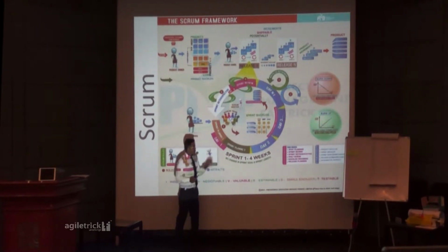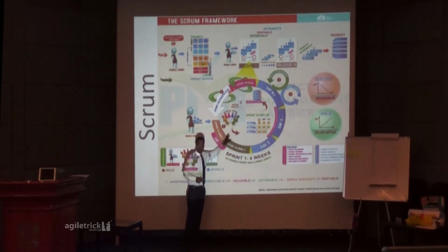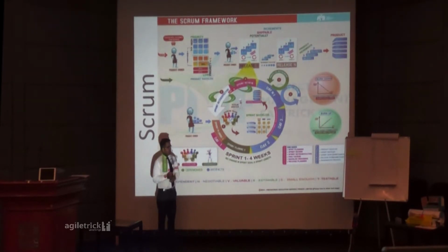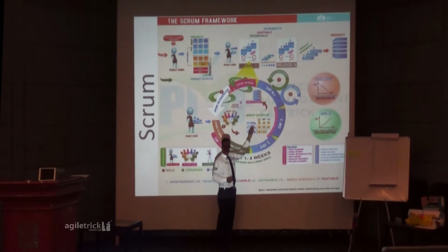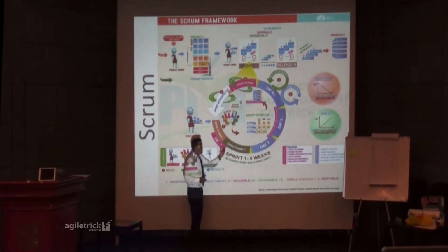The team needs to understand the business logic, user stories and acceptance criteria in sprint planning meeting 1. Any queries or questions they need to clarify there. Once clarified, they identify the top 5, 7, 10 or 15 user stories, and then they go to sprint planning meeting 2.